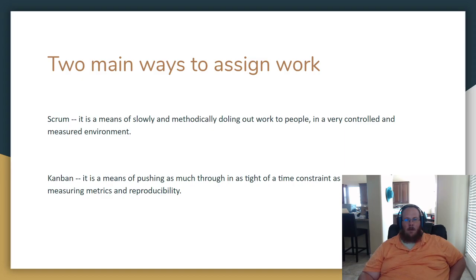It just means that the way that they estimate makes them worth a unit of 12. It's wholly unhelpful at the beginning. It takes 3 to 6 months to establish any kind of useful metric, and usually in that time there's enough turnover in companies or in teams that whatever metric you come out to at the end is just unreliable.